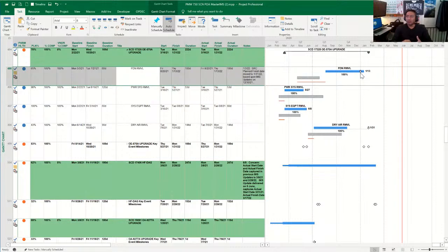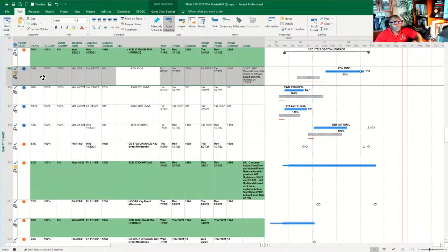Because by displaying that, you're able to say, look, we declared a deadline at this point, and we didn't meet it. So how can we better ourselves the next time around, now that it's been declared that we missed it? And also Microsoft Project does document missed deadlines, versus the leads or the lags.